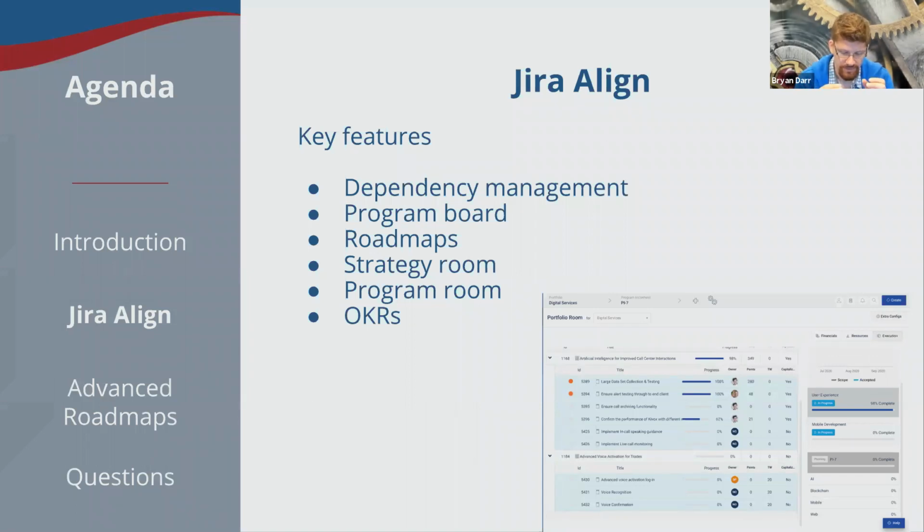They start out with a team requesting something, another team has to agree to that request, and then the other team has to deliver on that request. That's a 3-step workflow, so it does dependency management really well. There's actually a dependency inbox feature within the tool that helps team managers pick up dependencies from other teams and respond in a timely manner.